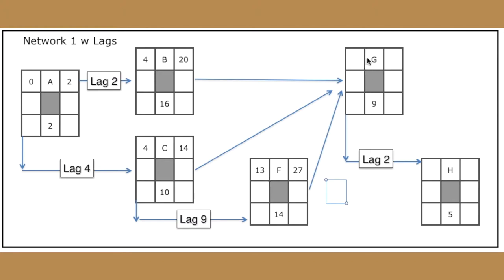Now, notice that for G, for its early start, we could have 20, 14, or 27. Well, we take the longer one because we have to wait for all three of these to get done, right? But F is going to take the longest at the time period of 27, so that's our earliest start time. We're going to add nine to that, which should be somewhere around 36.